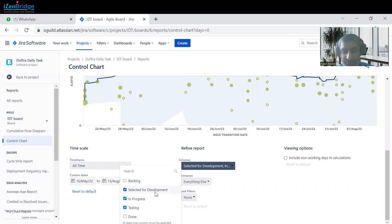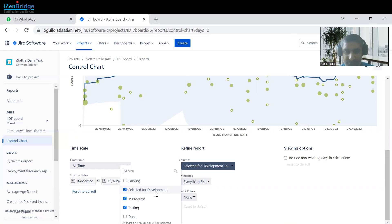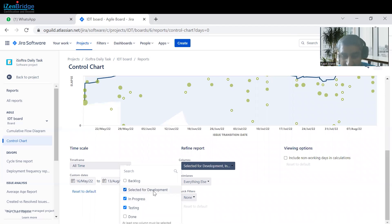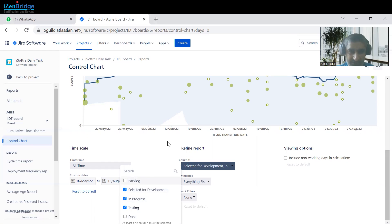Cycle time is when an item is picked for development until it is completed in the Done status — that is the complete cycle time for a particular item. If we just want to check the lead time, lead time is when an item is put into the backlog and how much time it takes to move to Selected for Development — that initial time is your lead time to pick that item.